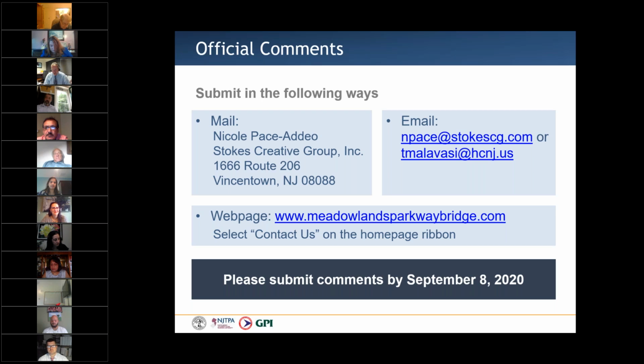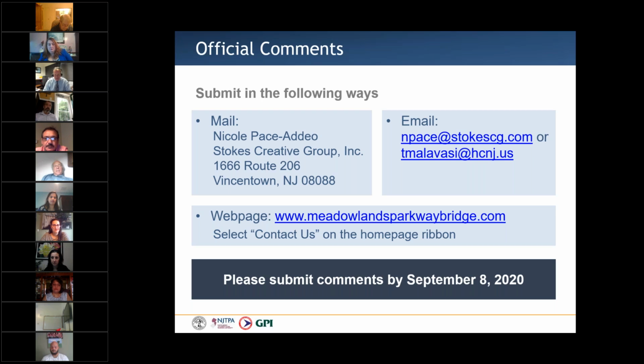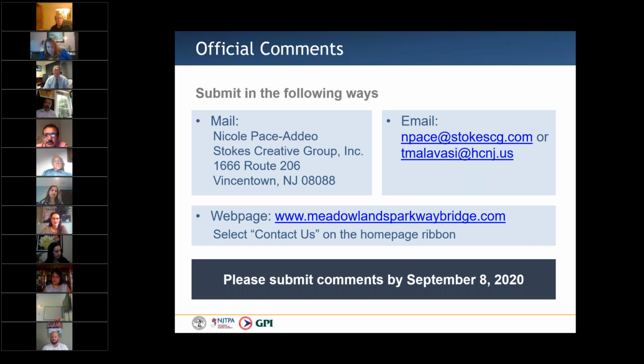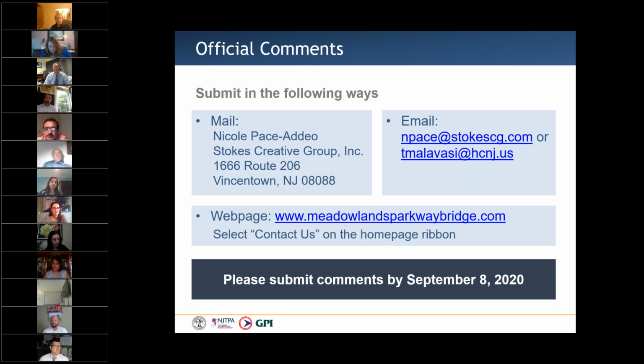Yeah, if I can expand on that, Nicole. We actually have, in the concept development phase, 2 public information centers. And really the process goes, we collect the data in the beginning. There's a lot of data to be collected. Then, of course, we analyze that data. And we then go and try to develop our purpose and need statement. Why are we doing this project and the need that supports this project? And that's where we're at now. So really what we're focusing on is to get everybody's input on why should we have this project and the justification for this project, the need.